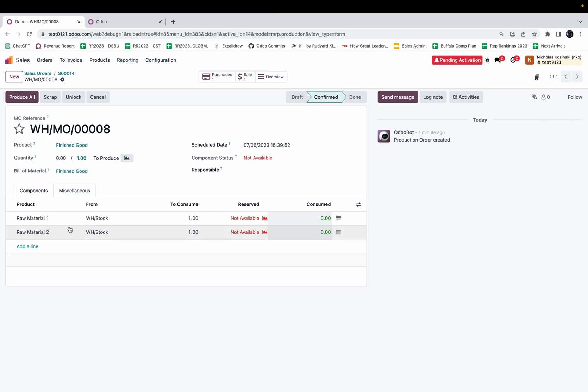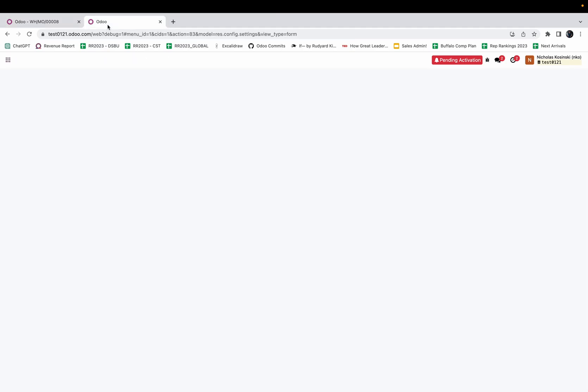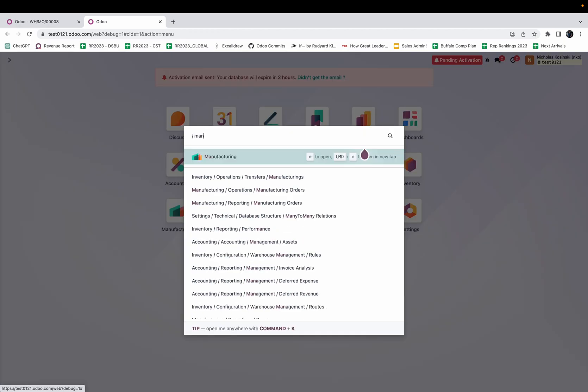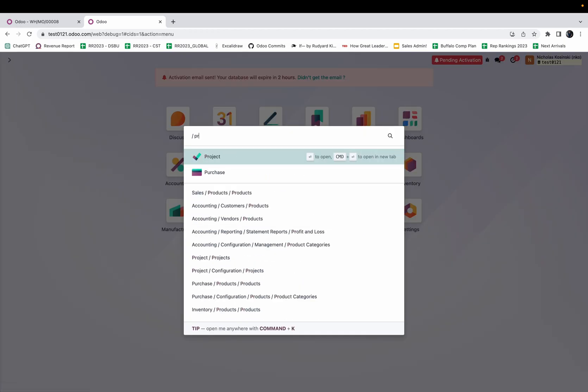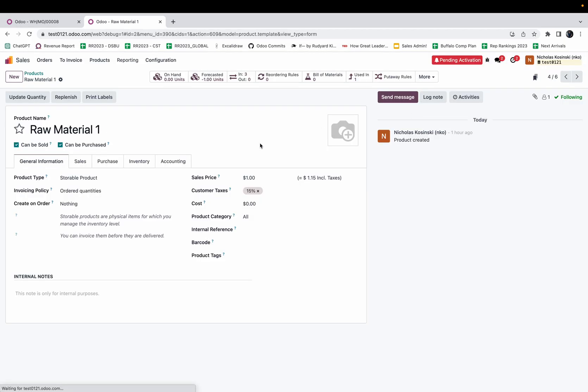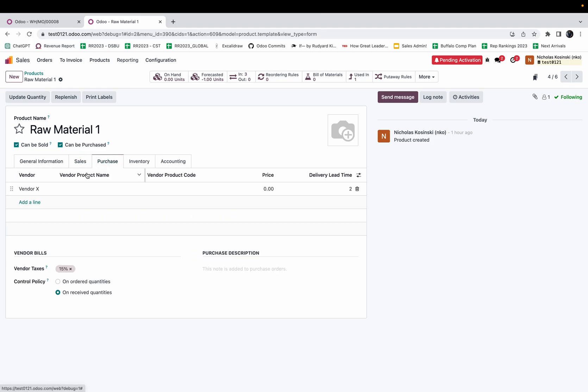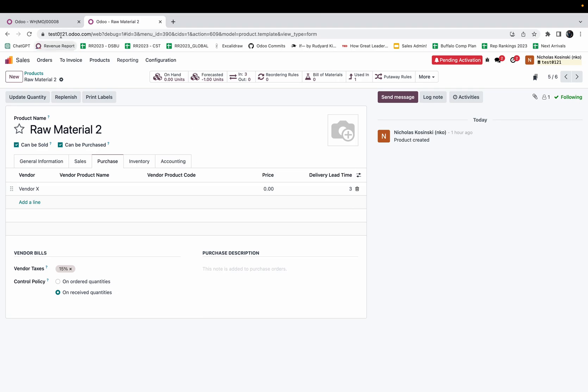Raw material one and two. If I look at these lead times in the purchasing tab, I buy raw material one from vendor X and it takes two days to get to me, and raw material two takes three days to get to me.